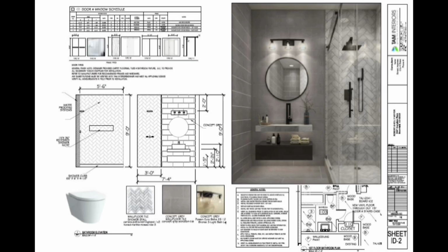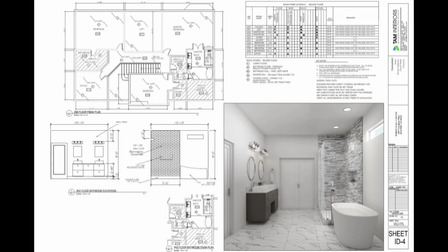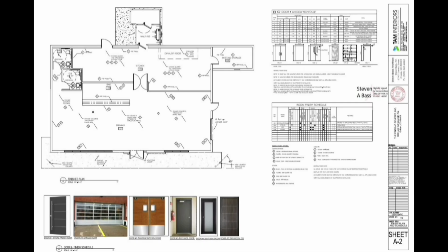This is also the phase where deeper collaboration begins. You will work closely with architects, engineers, and specialty consultants to ensure the design intent stays intact while meeting building codes, technical standards, and clients' objectives. The goal of this phase is to transform the approved schematic design into a coordinated, highly detailed design package. This package is then sent out for a preliminary rough estimate.